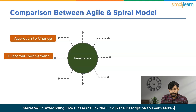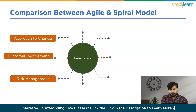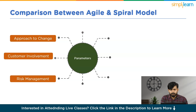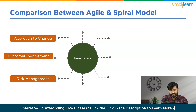The third parameter is Risk Management. The Agile model takes a more adaptive and iterative approach to risk management. Rather than having a specific phase dedicated to risk analysis, Agile teams continuously assess and respond to risks throughout the development lifecycle, identifying potential risks early and addressing them in subsequent iterations. The Spiral model, by contrast, is explicitly designed with a focus on risk management. The risk analysis phase in each iteration involves systematic evaluation of potential risks and development of mitigation strategies, contributing to the reliability and robustness of the final product.